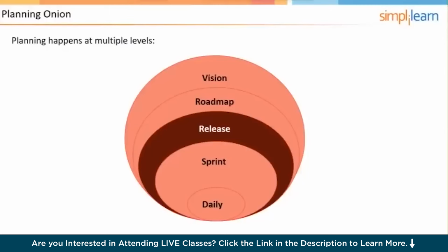And the product roadmap is then supported by releases. So for my project, I have 3 releases. So all of the user stories needed for the free version are in release 1. All of the additional user stories that are needed for the paid version, the subscriber version, and then also for version 3, those are all releases, 3 releases.